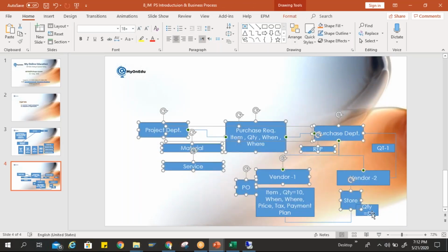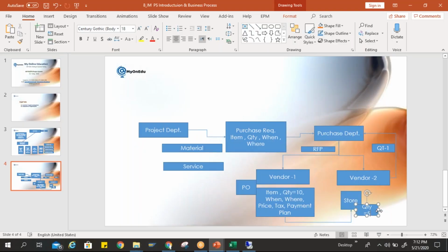Once this material is received, because the vendor has delivered the quantity 5, he needs money, he needs the billed amount. So he will take the receipt of the material which has been received in the store to the finance department, and the finance department will check all the system and execute one transaction here, MIRO, which we call invoice verification.